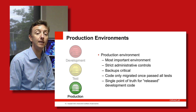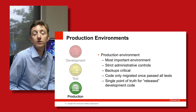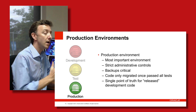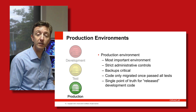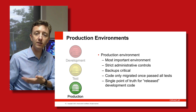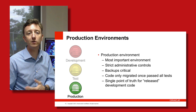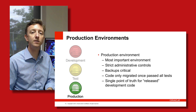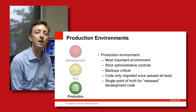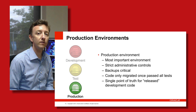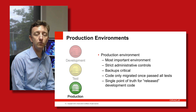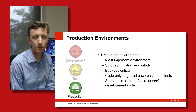That's one of the nice examples in software engineering and project planning where you can have parallel tasks occurring — your ADF developers focused on developing the systems, while your administrators, database administrators, WebLogic server administrators, and so on are actually putting the infrastructure in place. So get the dev systems up and running first to get developers working, but then get the admins to think about the test and production systems.